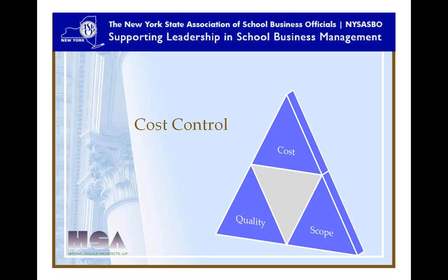One of the strategies we use is using alternates and unit prices, where we'll design different alternative solutions depending upon what we find when we start doing our renovation project. In one instance, this strategy saved over $200,000 for a client that we were able to reuse the roof insulation that was in good condition. We had done some test cuts and found that while the roof was leaking in many areas and needed replacement, a good chunk of the insulation throughout the roof was pretty dry.